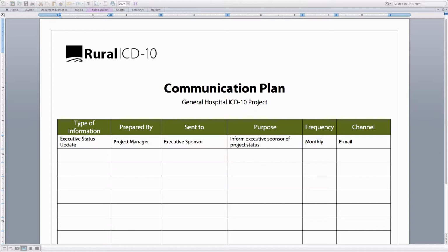So here's my answer as to why this needs to be done. If you don't communicate what's going on, it's human nature for people to assume that nothing is happening. I would hate for you to work hard on this project and your key stakeholders assume that you're unprepared. That's the importance of the communication plan. So let's dive right in and develop one together. One question you're asking is, who should develop the communication plan? That should be developed by the project team. However, the ultimate responsibility does fall on the project manager to develop, execute, and monitor the communication plan.